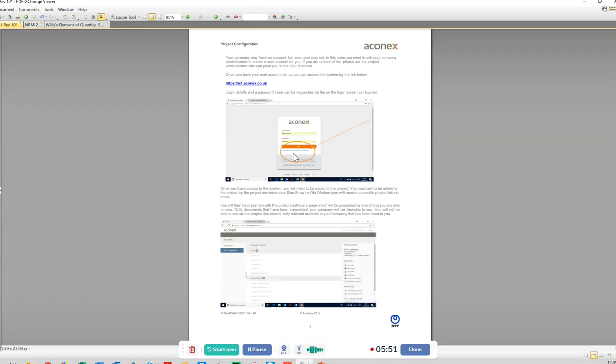And we won't get into all those details here, but then it just simply shows you how you get registered, and that's what this page is for. So you can see how helpful this document is for a new company who's coming on board, who's been given a package to do, whether it's doors, and they need to send their drawings, they need to send their technical submittals for approval, and this document just gives them a guide on what to do, how to number their documents, what the convention is, so that all documents go through smoothly and they understand what the process is for approval.